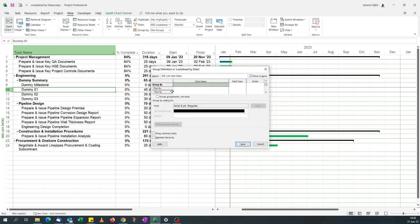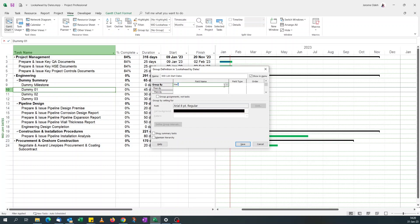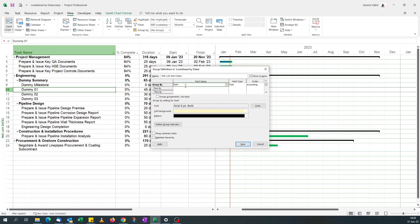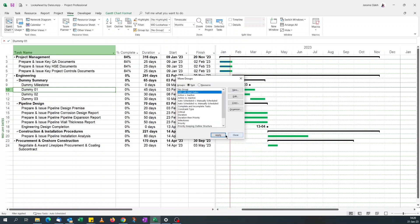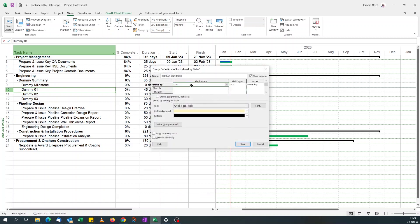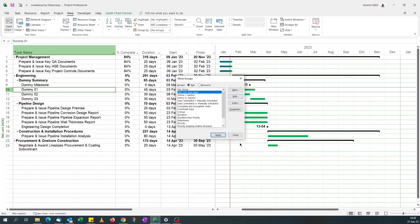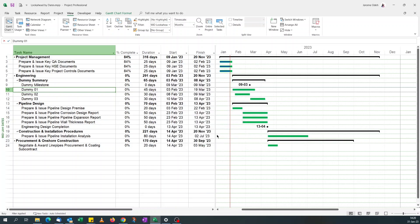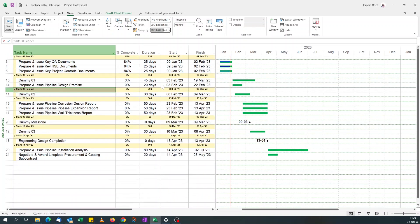So we'll call it 90-day look ahead start date, because I'm going to group by start date. Make sure the show in menu box is ticked so that it appears under the grouping. So say group by, we go for start. Click save. I need to edit something. Click save, apply.